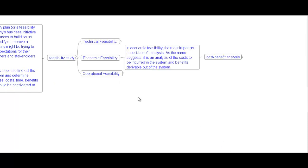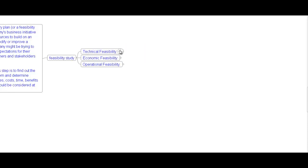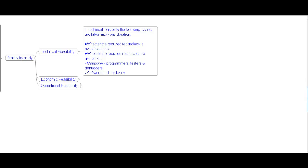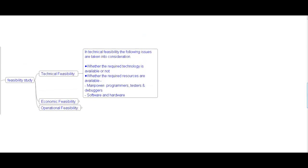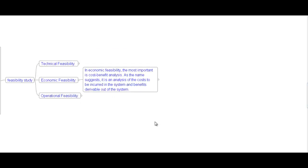Feasibility analysis has three types: technical feasibility, economic feasibility, and operational feasibility. In technical feasibility, the following issues are considered: whether the required technology is available, and whether the required resources are available — such as manpower, software, and hardware. In economic feasibility, the most important analysis is cost-benefit analysis — an analysis of costs to be incurred in the system and benefits derivable from the system. Development costs are one-time investments such as wages and equipment. Operational costs are recurring expenses such as wages, supplies, and overhead.